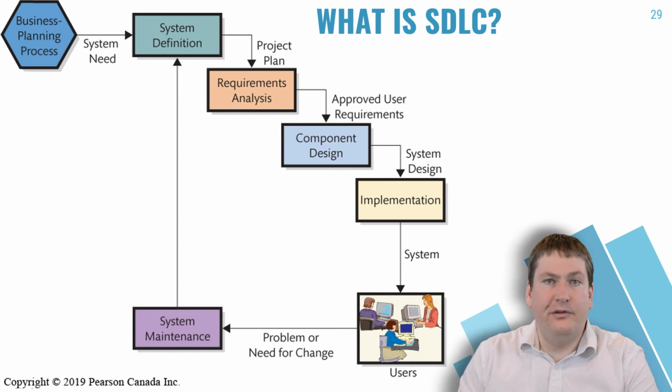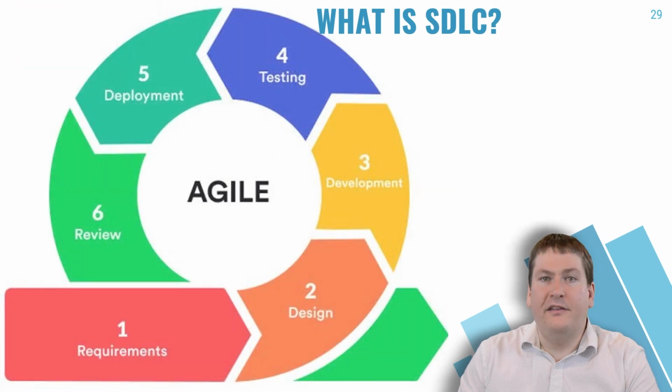There are a few potential solutions to this. Newer methodologies such as Agile methods and the Scrum approach use 2-week development sprints that are designed to develop smaller components of the system, test them, and then reevaluate to see if any changes to the requirements are required. Teams using this methodology are set up for and expect changes during development, so they're better able to handle changing environments and requirements. This makes the cycle we discussed much shorter, and the project will go through many such cycles before it's implemented or ever finished.